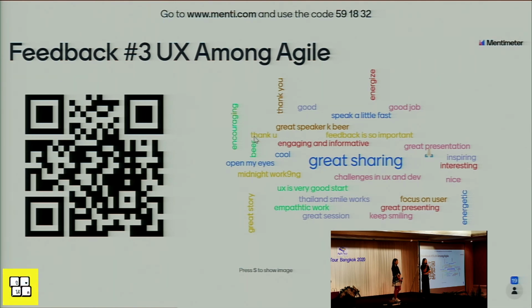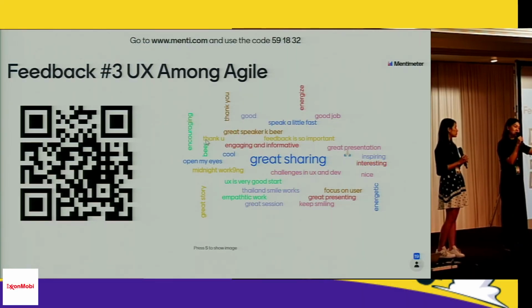Actually, that is one of my struggles as well, because user requirements are mostly not one or two, but 20 slides of PowerPoint that they need, right? So my way of working, I pair up with the product owner and go through every item together. What is my recommendation for this change? And it will be nice if we have the user in that call also, to get alignment. Like, what about this? Why do you need this one? Can we remove this one? Can we run the process? Can you run the operation without this function?